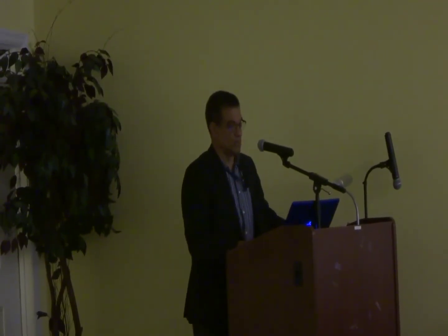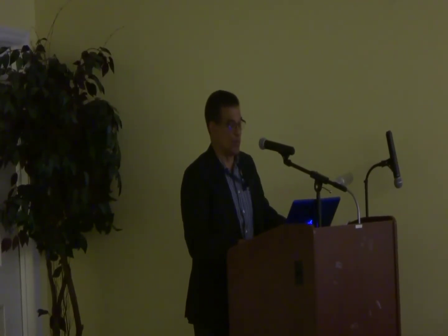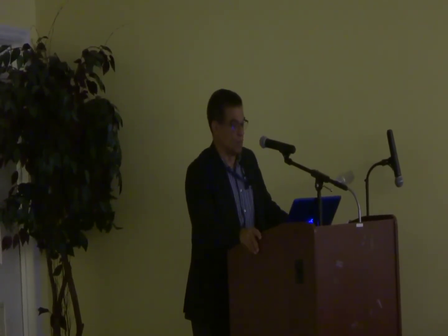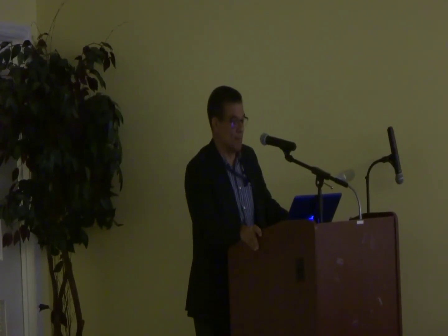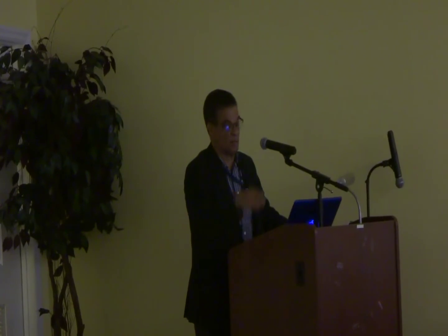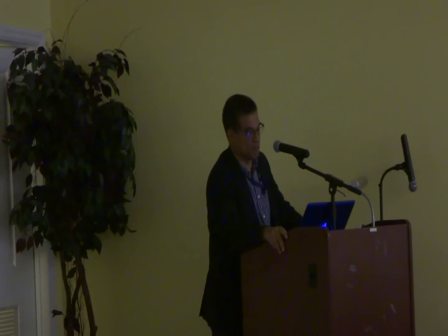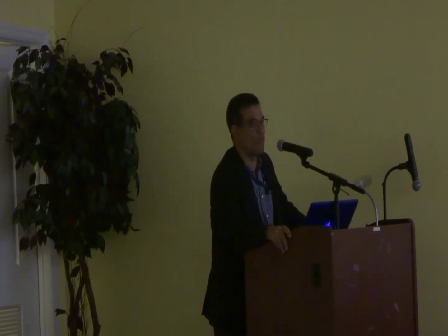What is important? I want to show you the typical form of a tender opening paragraph. Notice the word offer here. Having examined the conditions of contract, specification, tender quantities and addenda numbers, whatever. Addenda are the things that go out during the tender, which we will come to. For the execution of the above named works on a lump sum basis, we the undersigned offer, notice the word